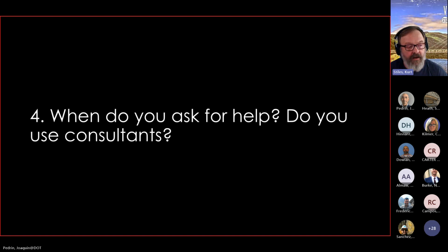But we've done a lot of master task agreements. How that works, in a nutshell, is we get all of the paperwork finished to do business legally, but we haven't spent any money. Then we write a task order, and all the who, what, when, where, why gets done, conditions get set. Verge is the director, XYZ Visualization Shop is the producer, and then we go to work.